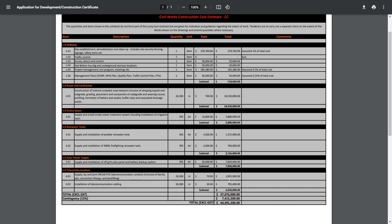So of these that you're looking at, the only ones that you can actually see are legitimate costs: the general costs, the roads and earthworks, and the telecommunications. The on-site sewer, the rainwater tanks, and the solar power supply are more along the lines of owner builder costs, and they are not part of the construction costs of stage one.